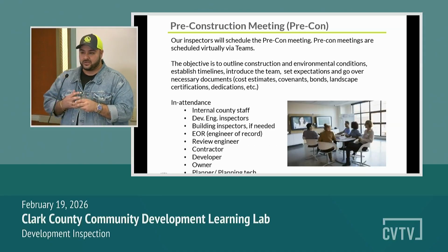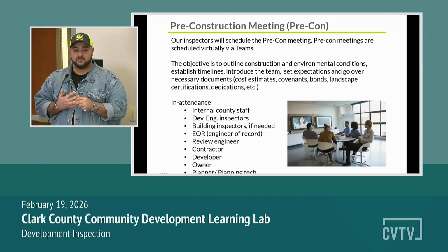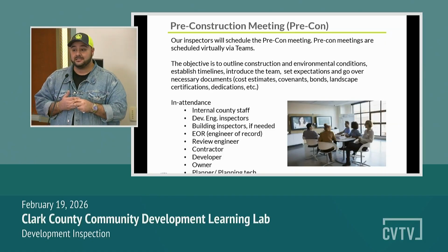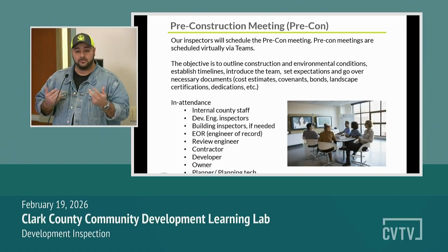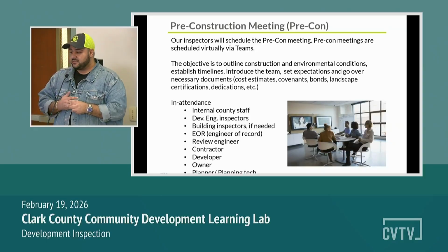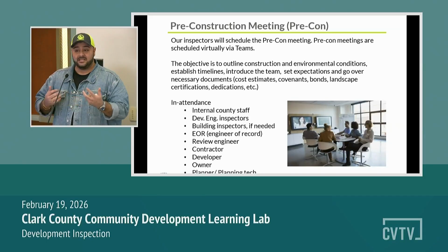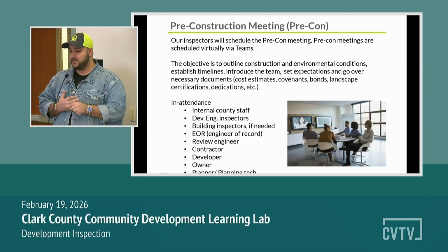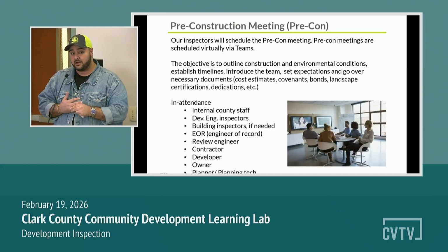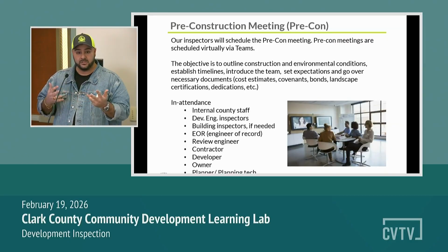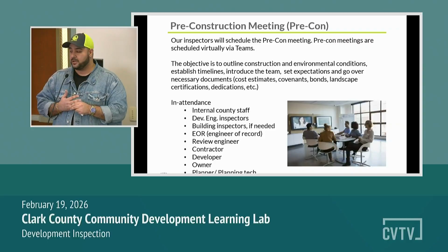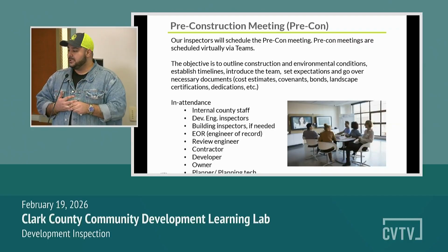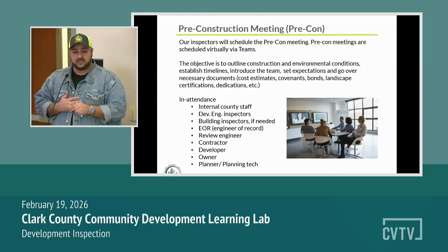Once you get to the pre-construction meeting, our inspectors will schedule the pre-con meeting. Pre-con, in short, is what we refer to it as with you guys. It is a Teams meeting. It's a virtual meeting with all parties involved. The objective is to outline the construction and environmental conditions. We want to establish the timelines with you guys. We really want to make sure we introduce the team, everyone involved, make sure your questions are answered and you know who's going to be partaking in your project, especially on the public and the private end. That's really important. We want to set expectations and go over necessary documents.